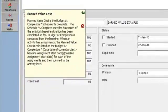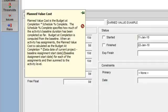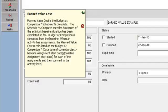Let's talk about planned value cost. Planned value cost is the cost of work that should have been accomplished as of the data date if the project had proceeded according to the baseline plan. The calculation is budget at completion times schedule percent complete. Schedule percent complete specifies how much of the project's baseline duration should be completed as of the data date. Planned value cost answers the question: how much work should be done as of the data date?